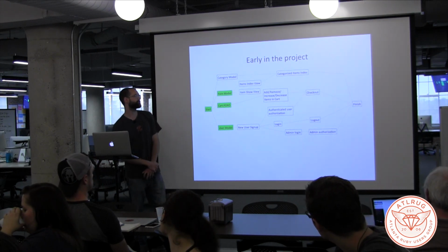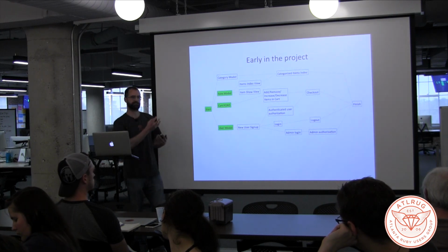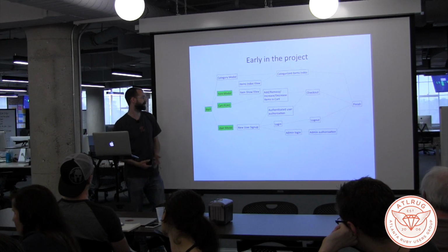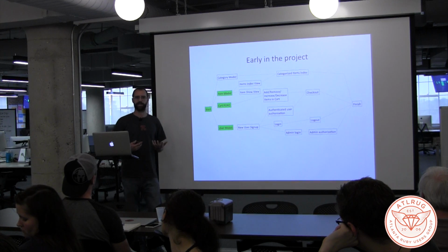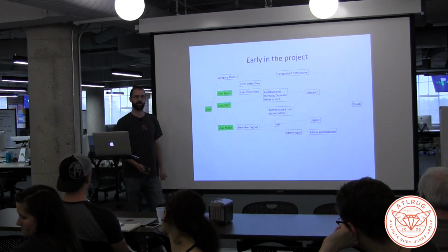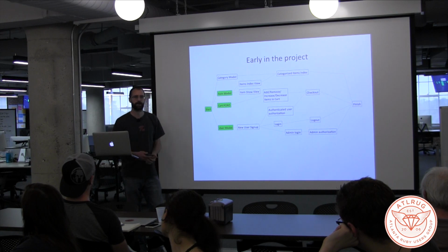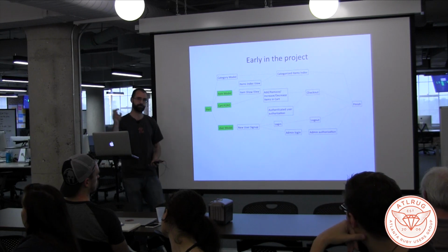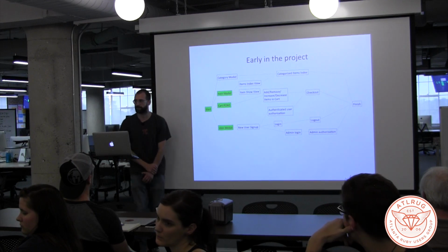Sure. Probably the better approach would be to have user stories in here instead of implementation details. In this case, a cart, plain old Ruby object, is a design implementation decision that we made, but a better way to put it would be in terms of the user story about the cart. Yeah, those boxes might just end up being user stories. Exactly. So what pieces of a user story depend on something else being done already. Yeah, cool. All right, thank you.